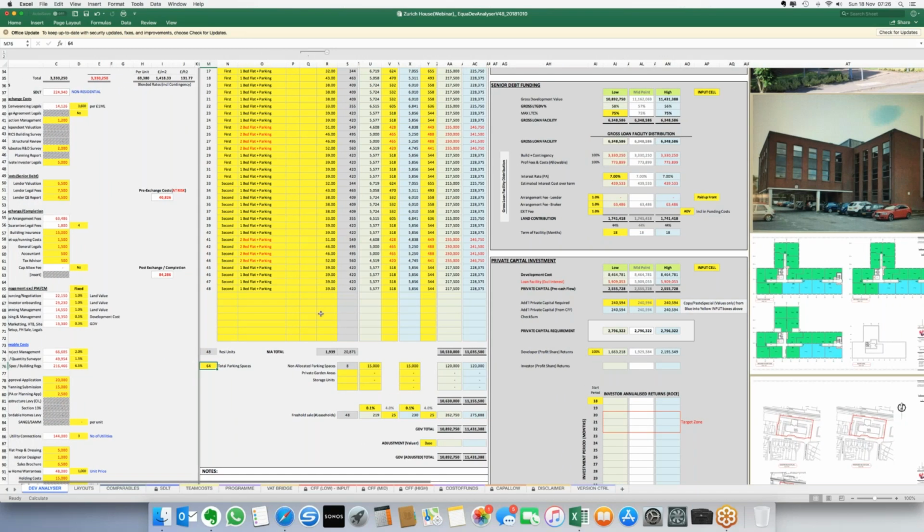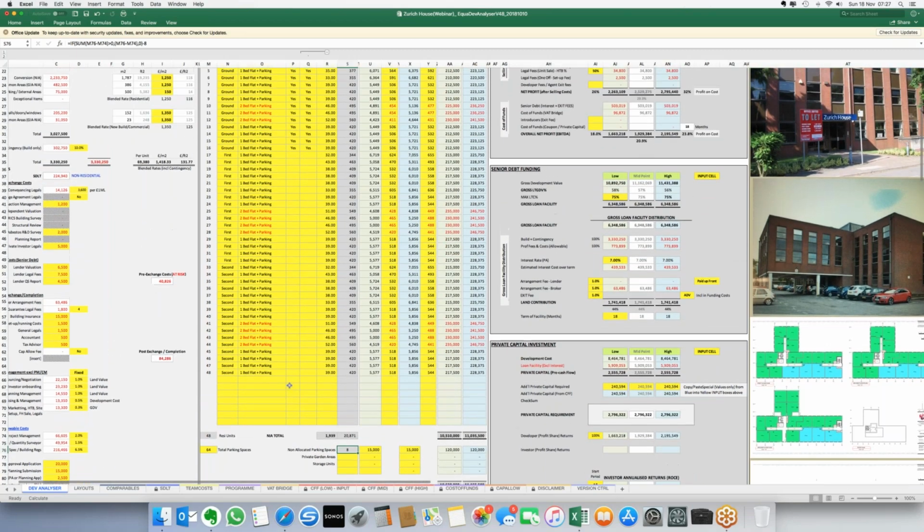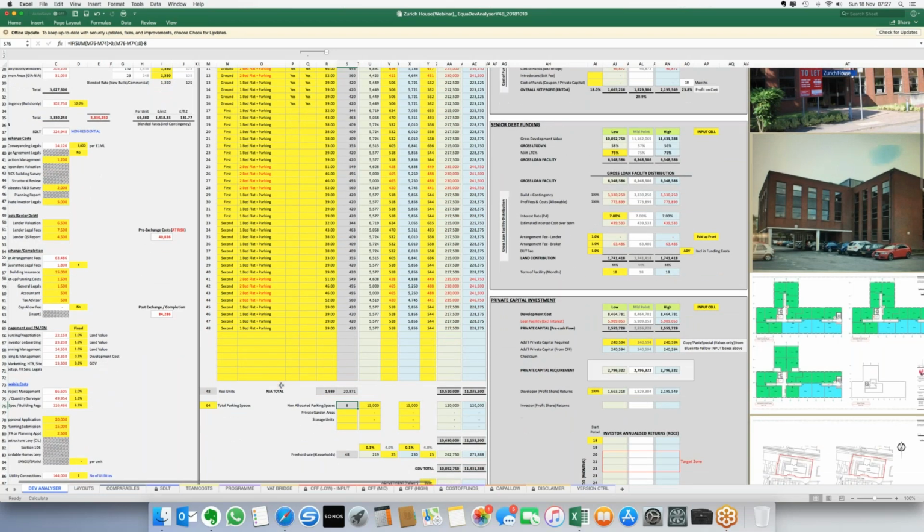We then have 48 residential units, and if you remember, each we've allocated with a parking space. So 64 minus 8 minus 48 leaves us with unallocated parking of 8 spaces. Now, with a matter of scarcity, only 8 across 48 apartments, do we feel there's a high probability we can sell those on?